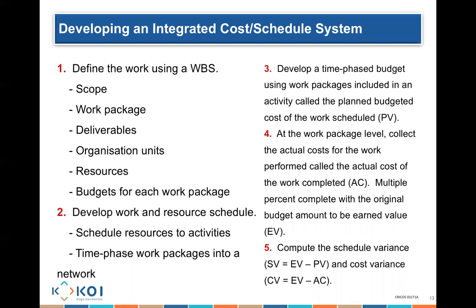So we really need to go and actually think about that information in detail. But the first and most important thing at the beginning is we need to define what I call a work breakdown structure from the beginning. That is the beginning of everything in traditional project management. We create that, and from there we start assigning people, time, budget, and so on. This is when we start knowing how much money is going to be spent, or supposedly should be spent, at any particular point of time.